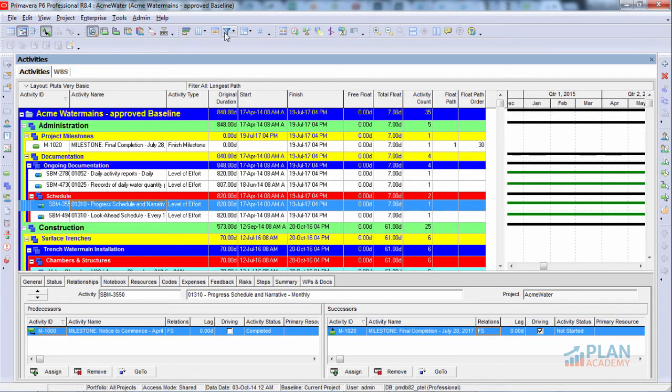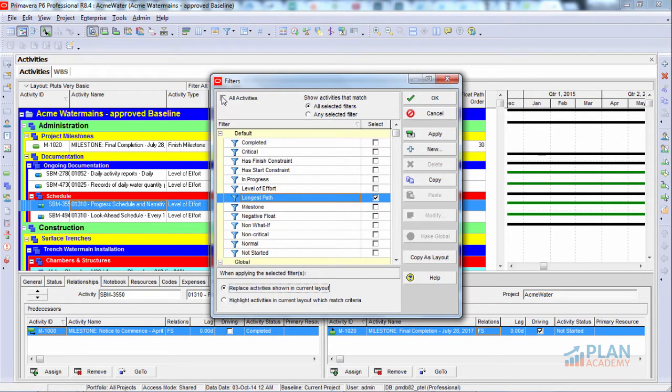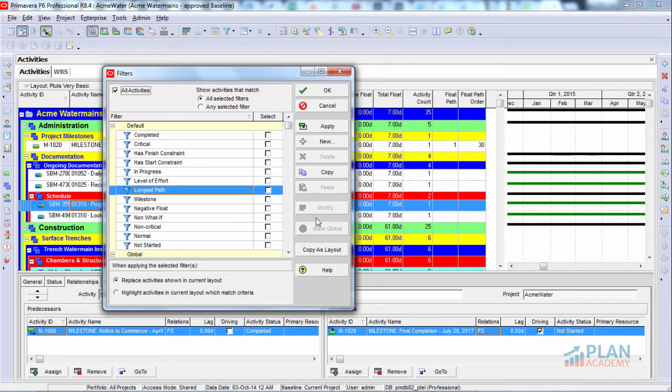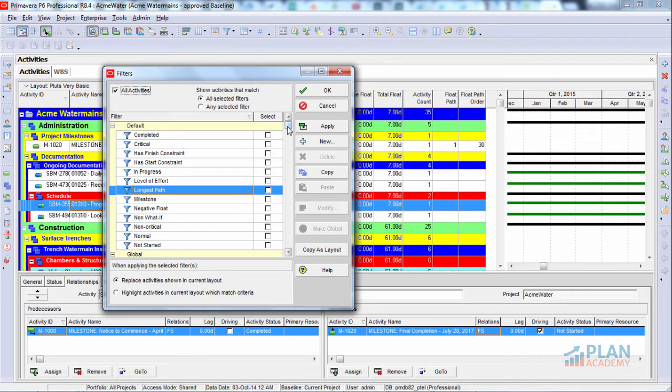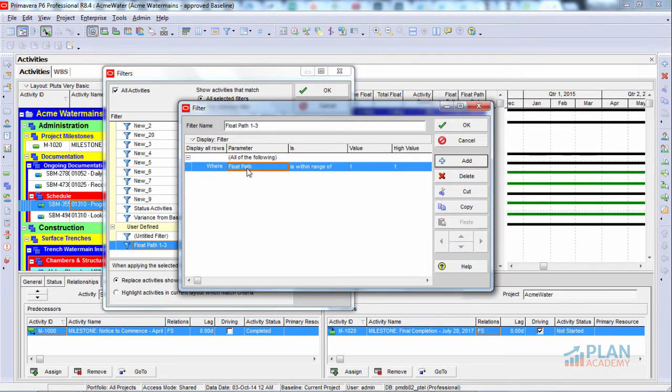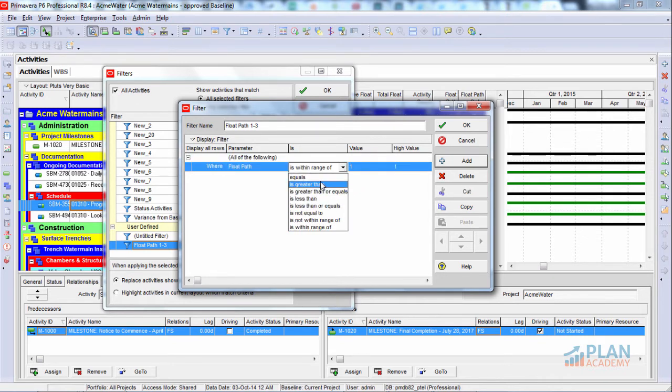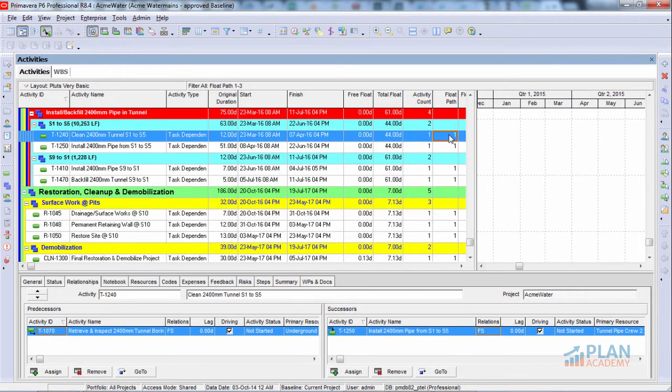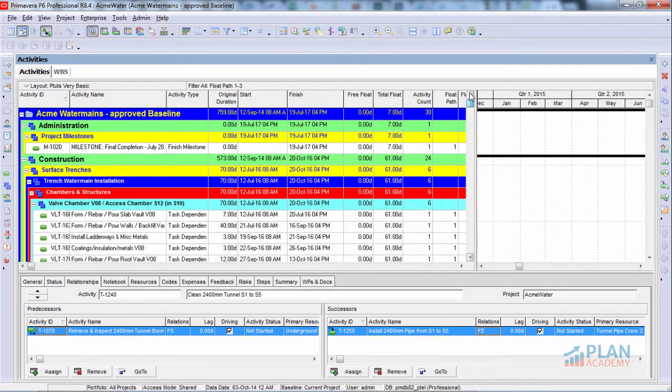What we want to do is go back into our filters and simply turn off any filters that we might have on. Now, float path will have a value of 1, 2, 3, 4, 5, and up to the number of float paths that we've generated. I did 10. But we really only want to look at the first one. So what we're going to do is create a filter where we filter out all activities that have a value of 1 for float path. And I've got that filter built already. Here it is. Although I've called it float path 1 to 3, if we have a look at it, it just says float path is within the range of 1 to 1. Or you could set this to is equal to 1. That works great. Okay. We'll turn that on. Now we're filtering on float path where float path is equal to 1.